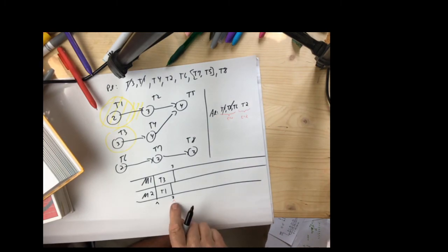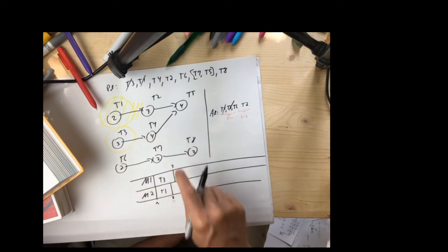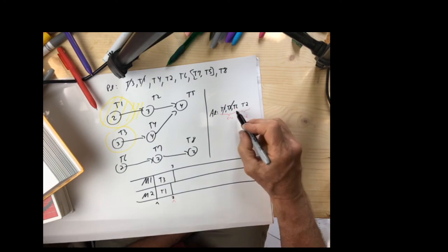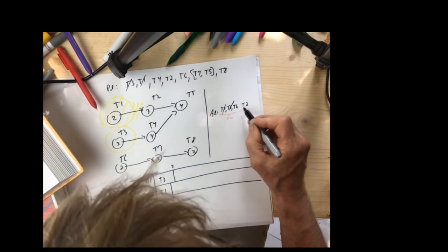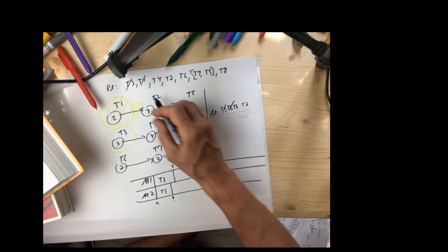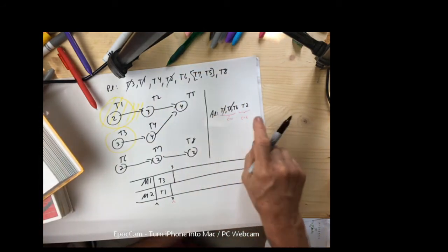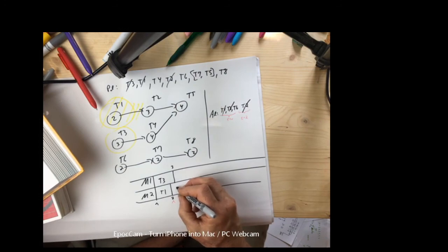We are now at time equals 2. One job is running. One person is waiting, but two jobs are available. We need to pick between T6 and T2. So I go to the priority list and discover T2 is listed before T6. So I put it in.